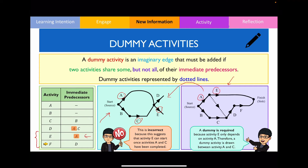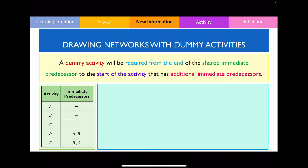Now that you understand why dummy activities are needed, let's look in more detail at how we draw them. To draw a dummy activity, you draw from the end of the shared immediate predecessor to the start of the activity that has additional immediate predecessors.